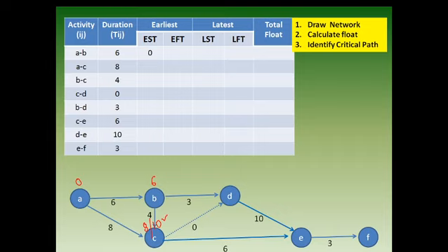Okay, for this activities, first of all we will fill the table. First one is 0 and next is 6. A to C. A's EST is 0, EFT is 8. Fill this 8, done. Now B to C. B's EST is nothing but 6, whereas C's EFT is nothing but 10. So now from these two values we will eliminate this 8 value and we will adopt the 10.